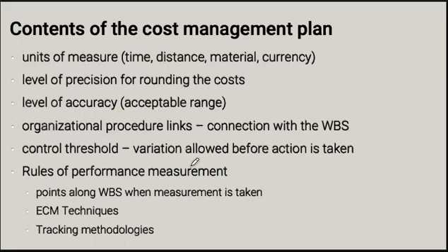We're going to have some organizational procedure links, so that will provide a connection between the cost and work breakdown structure through formation of cost centers. So if you remember from the work breakdown structure, each of the lowest level deliverables of the project is called a work package, and according to the project management philosophy, each work package should have its own cost center or cost account.